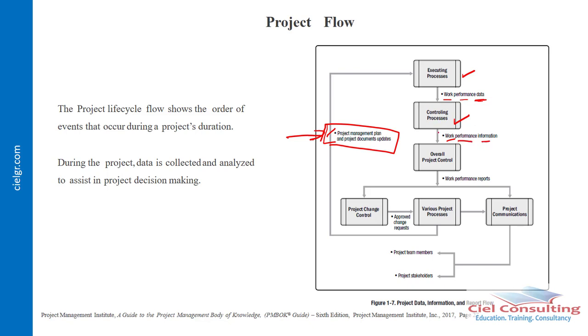So in essence, the output we're going to get typically during the controlling stage of our project is our work performance information. Work performance information is basically data that has gone through refinement and has been compared with forecasts that we have in the plan, which enables us to get information, which is the interpreted data that helps us to determine the project variance as well as the index, and also helps us in determining the status of the project.